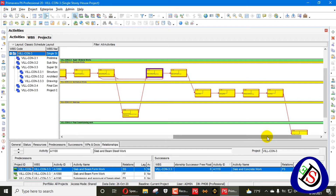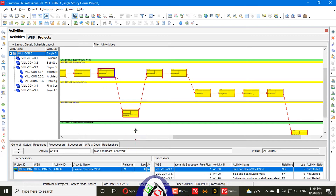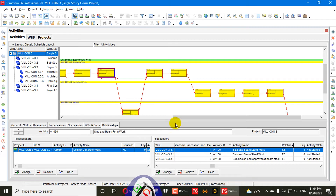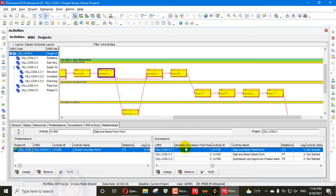You need just the CPM relationships that are driving your activity and are logical. A relationship is considered redundant when one of the activity's successors has the same relationship with a lesser relationship free float. For example, this activity and this activity — its successor activity, like slab beam steel work — these both activities have a relationship.